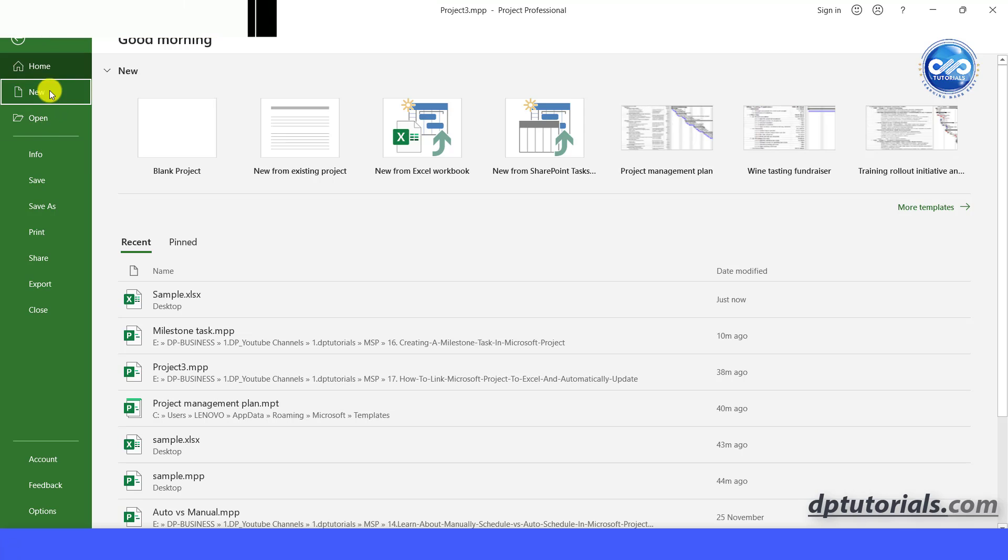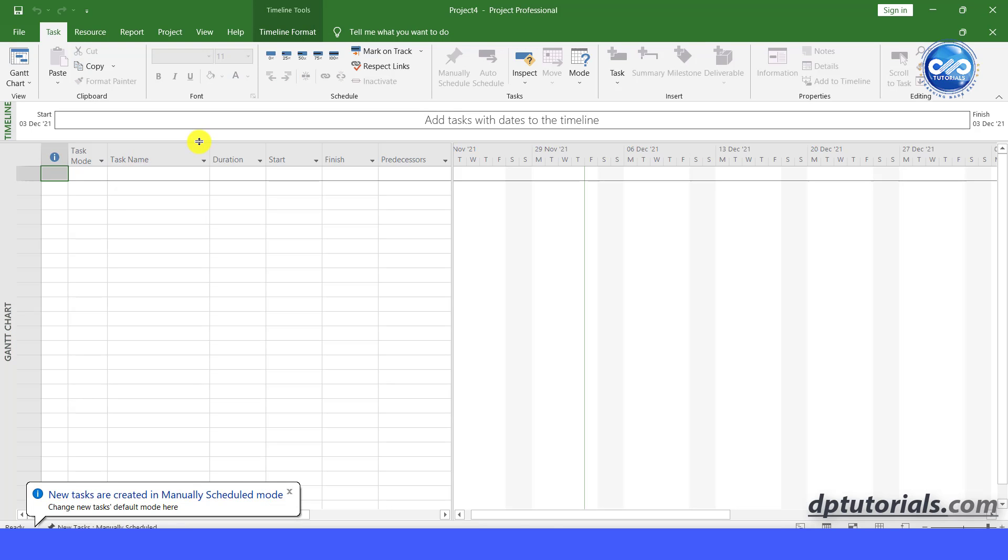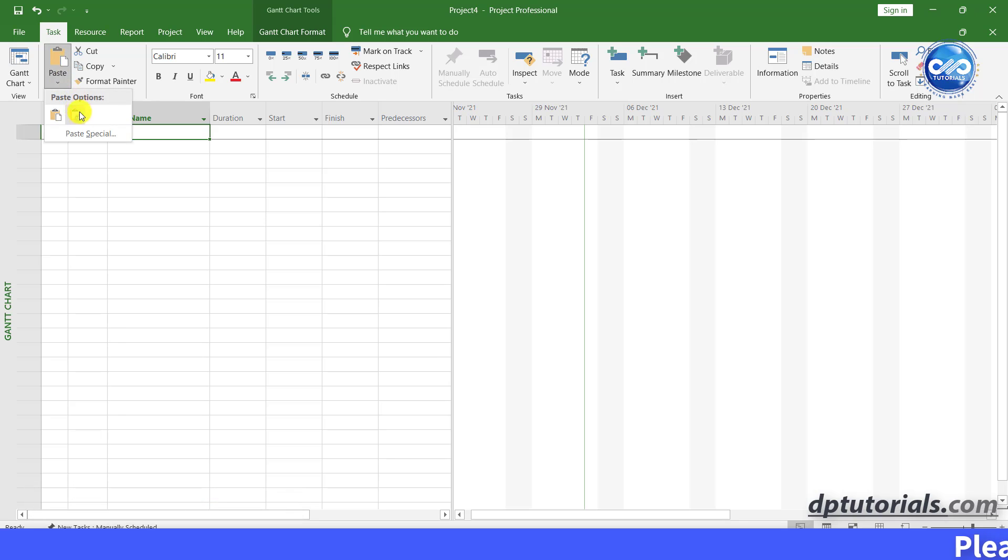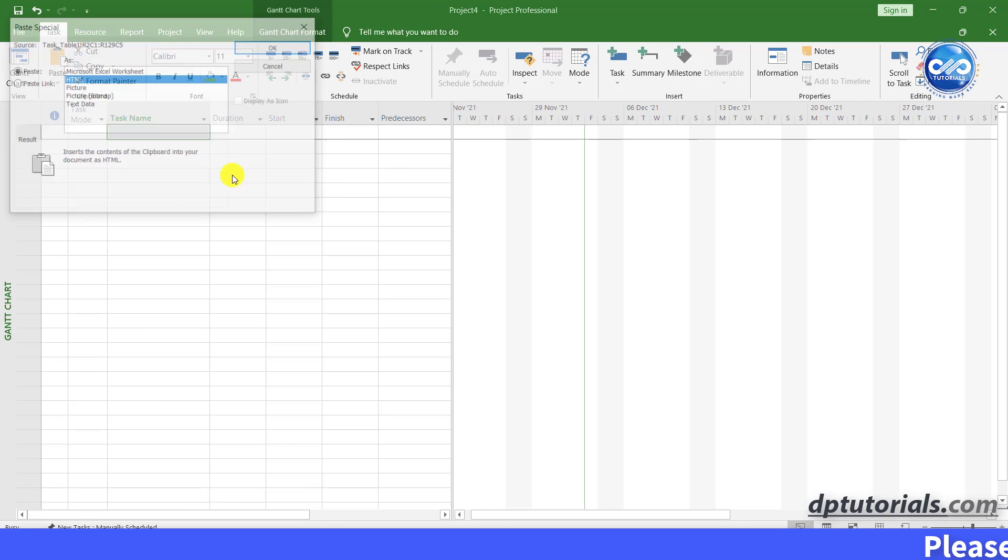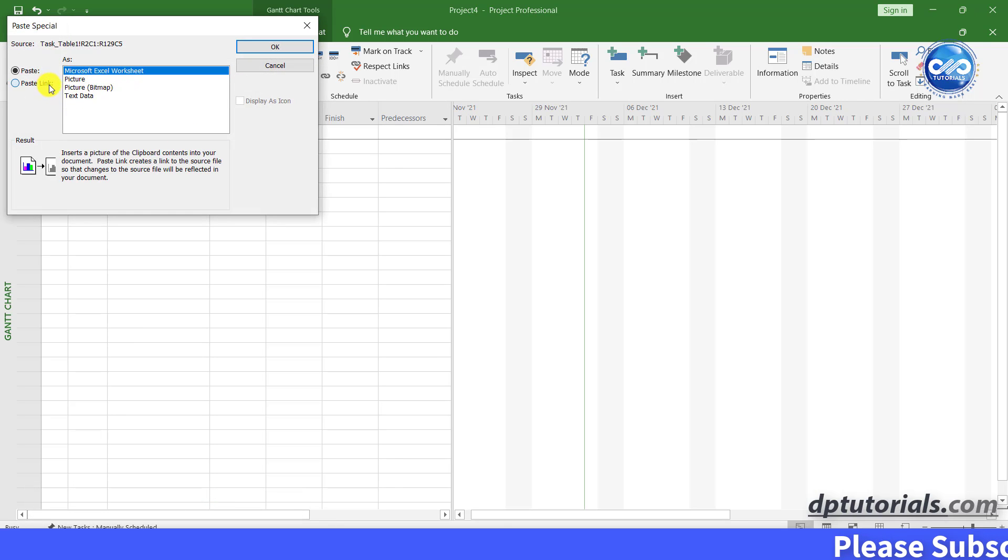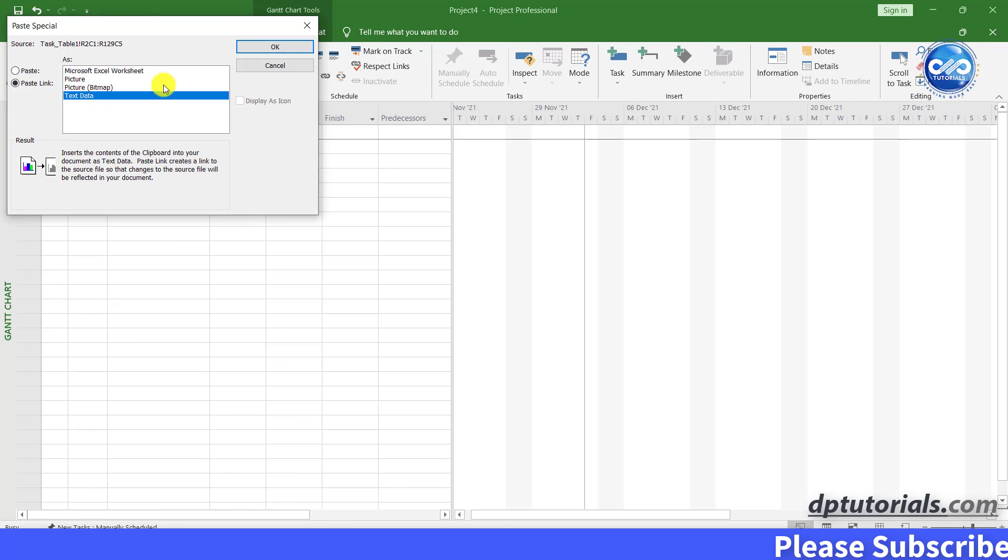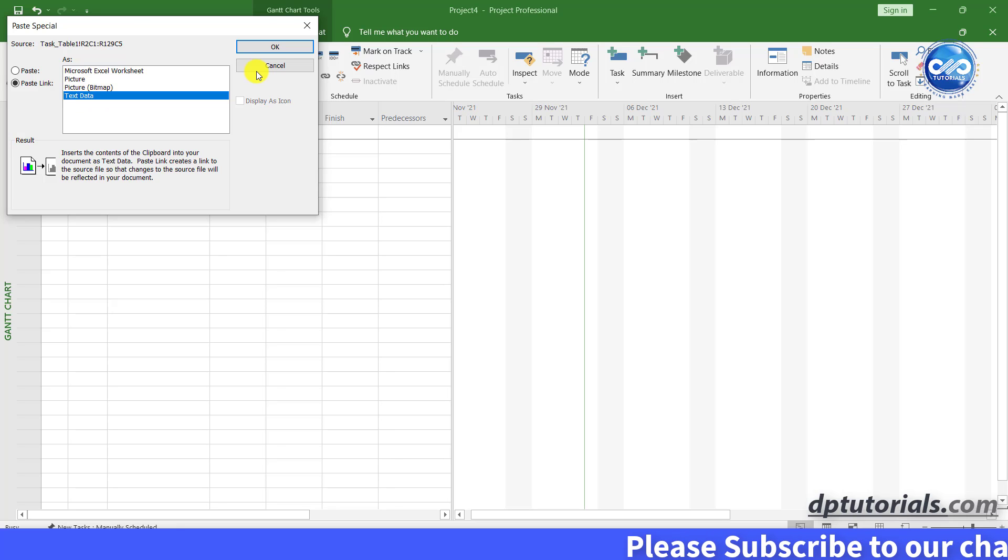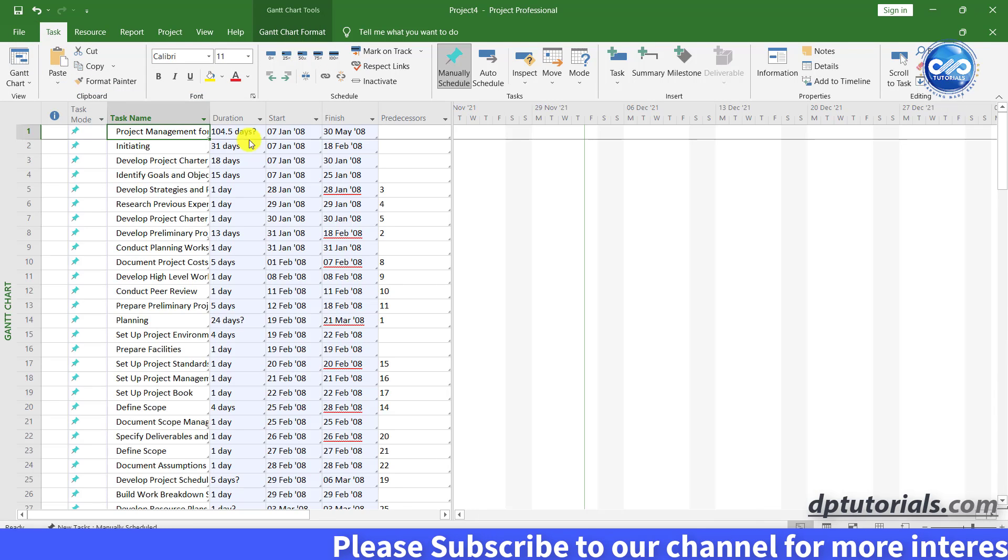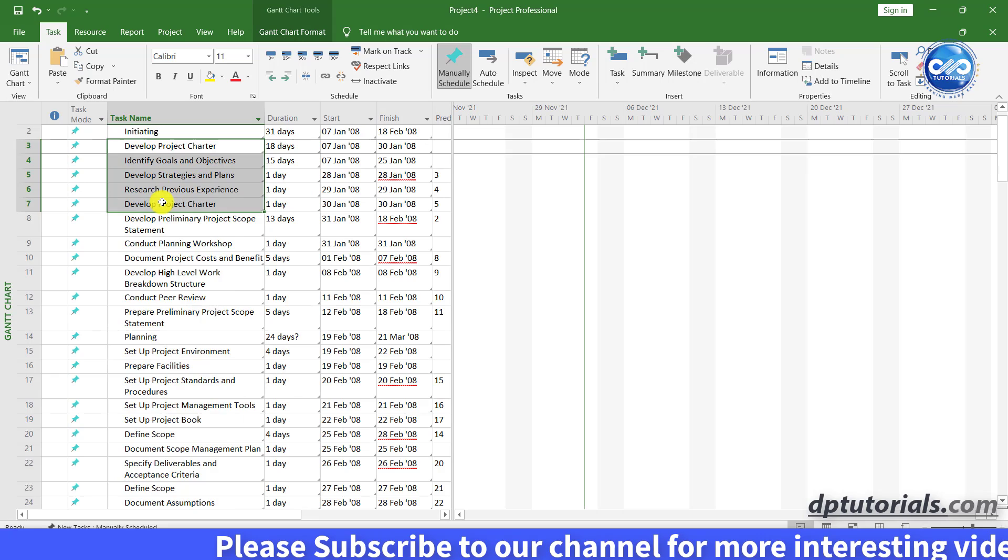In the task name column, click on first cell and paste special, select paste link, select text data and click on OK. And you can see the schedule like this.